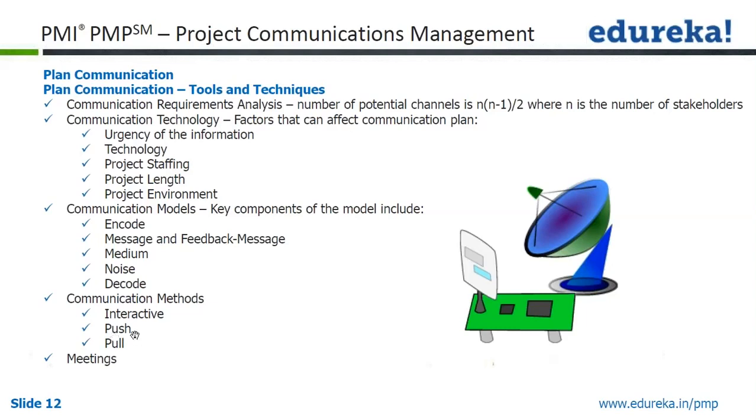The pull communication method is used when you have stakeholders to the tune of thousands, let's say tens of thousands of stakeholders, wherein sending email to each and every one of them will incur a lot of costs in terms of sending those messages, maybe using the system and man hours to push the message.